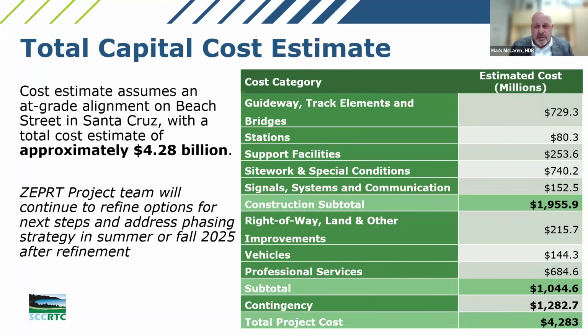So I guess first and foremost, to walk you through, this cost estimate is divided into a number of categories that are consistent with the way a project like this would be developed. That means we have a lot of information that rolls up under each of these categories and provides an aggregate for certain types of activities. And then there are things such as contingency and professional services that go on top of that, because they are done kind of holistically as it relates to some of the different activities included in here.